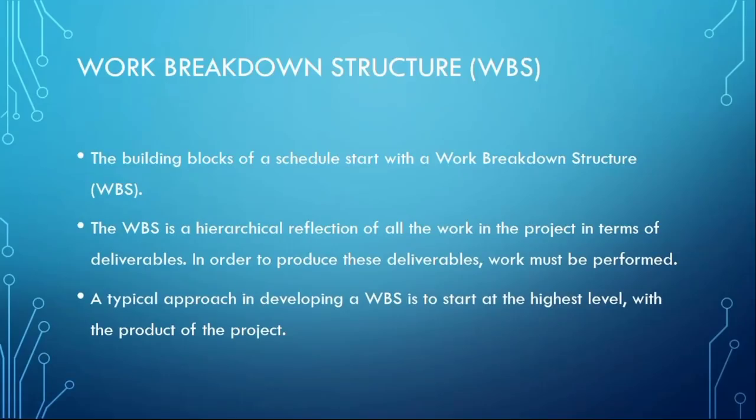Now look at it. When you have work breakdown structure, it's very easy for you to assign time frame. It is very easy for you to assign resources, be it material resources, human resources, equipment resources, and the rest of them. So can I just say foundation, how many hours will it take us to build foundation? You say 2 hours. You may be wrong. You may not be able to achieve that foundation in 2 hours. Why? Because you have not considered the tasks individually that make it up.